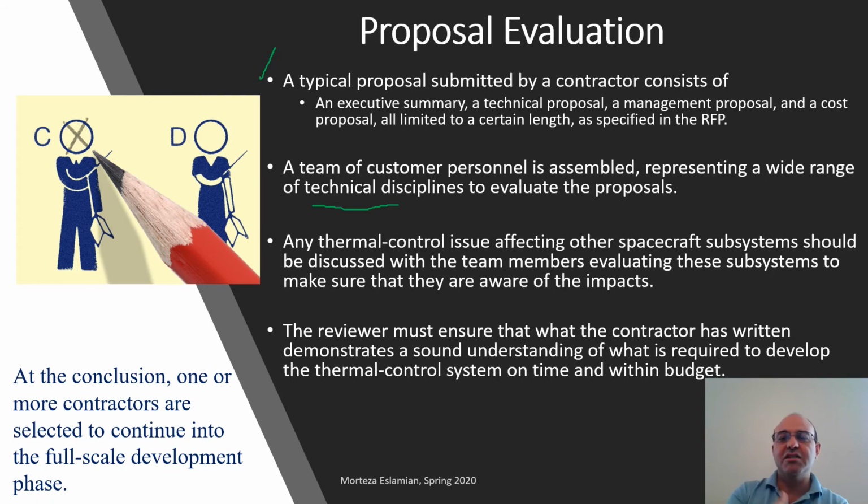So let's say multiple responses have been given to NASA, then NASA assembles at least one representative from each subsystem so that everybody can understand the proposal from different perspectives: electrical engineers, computer, software, mechanical, structural, thermal, communication, RF.